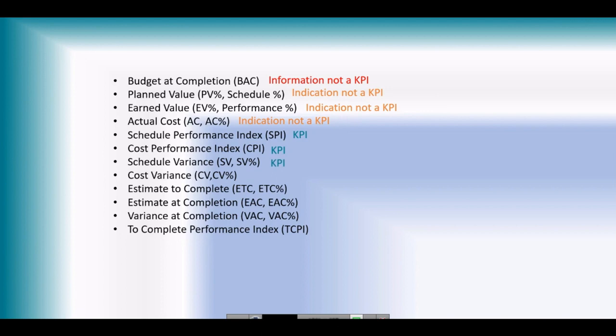Schedule variance also tells you that if you are negative, at minus 2.5, you are behind the scope of work. Whatever scope you have planned at any particular time period, at any status of the project, you are behind your target, your goal. Cost variance is also telling me that, whatever you have earned from the client or the sponsor, in order to earn that, your variance is more.